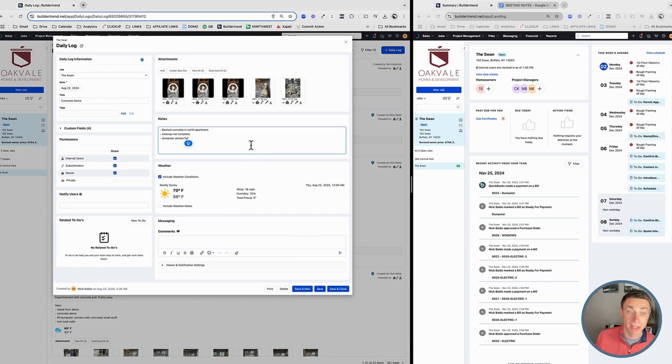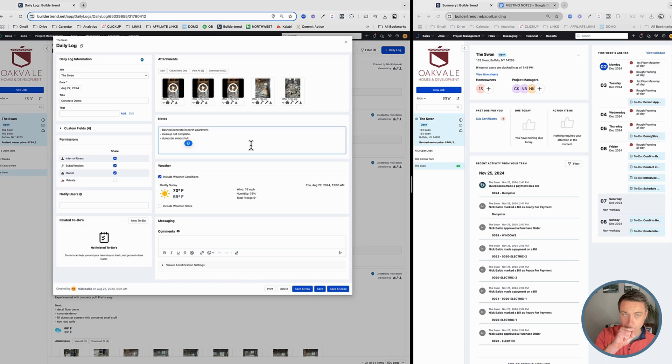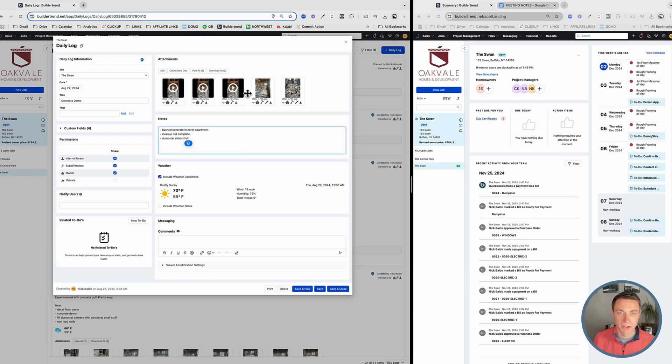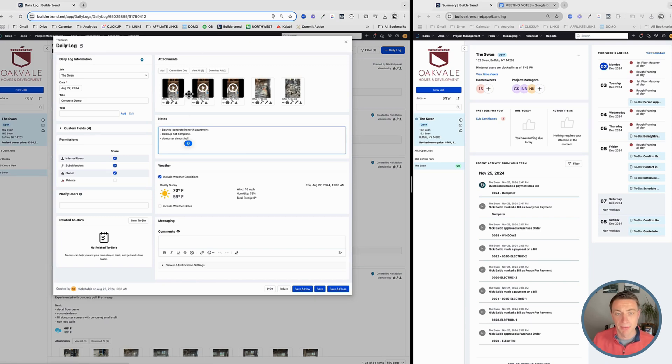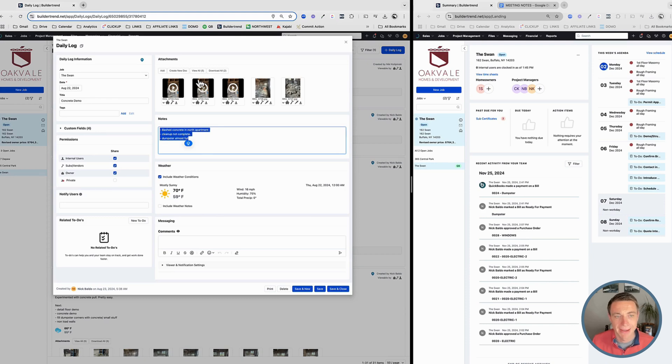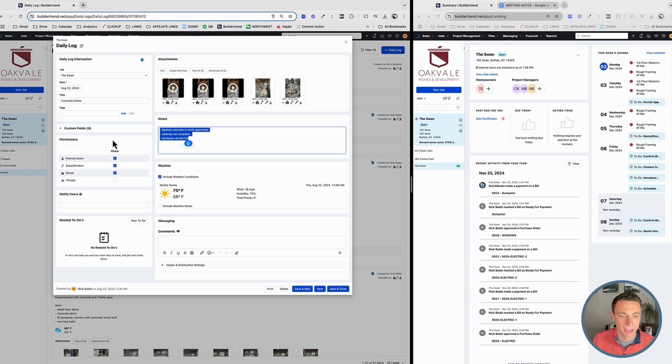The way that we work in our team is that we have five or six projects going on at a time. Myself and the management team, project manager, production manager are going to meet every morning, review daily logs, and we're often looking at pictures. They said that this was done. What does it actually look like? And so that's important. Fill out the notes, add pictures. All of that is really, really important.